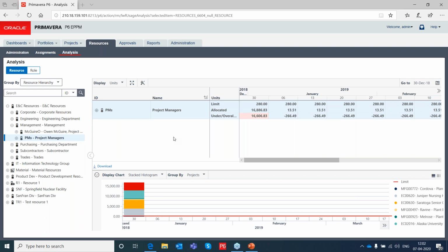I have another question from Asadullah. Dear sir, how often is resource leveling used for a particular resource and whole project resource? Yeah, leveling can be done whenever you have a need for that. Once you know that a resource is getting over allocated, then you can go for a resource leveling. That can be done any point of time, and you can open multiple projects at a time and then do the resource leveling for all the projects. That is also possible.